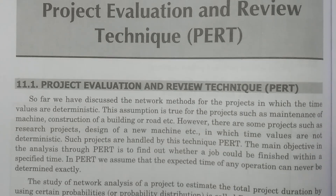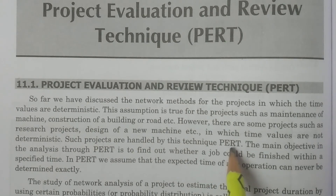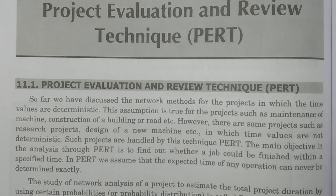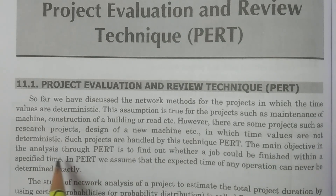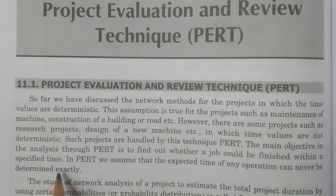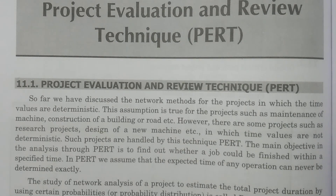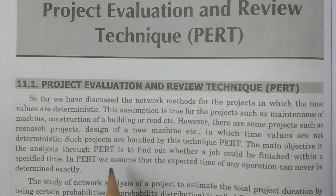In such cases, these projects are going to be handled by the technique PERT — Project Evaluation and Review Technique. In PERT, the time periods are not deterministic. The main objective in the analysis through PERT is to find out whether a job could be finished within a specified time, and what is the expected time period to finish the project — that is what we calculate using PERT.